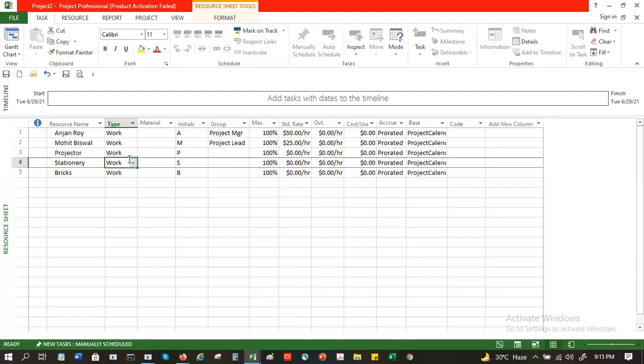So in our projects we used to define the role, and then against each individual senior scientist or senior engineer, how many, two senior engineers, how many hours you are estimating for that particular project, their involvement. Correct. So you used to run it and the project is generated. That project you used to send to individual departments. They used to see it and accordingly they used to bill their hours.